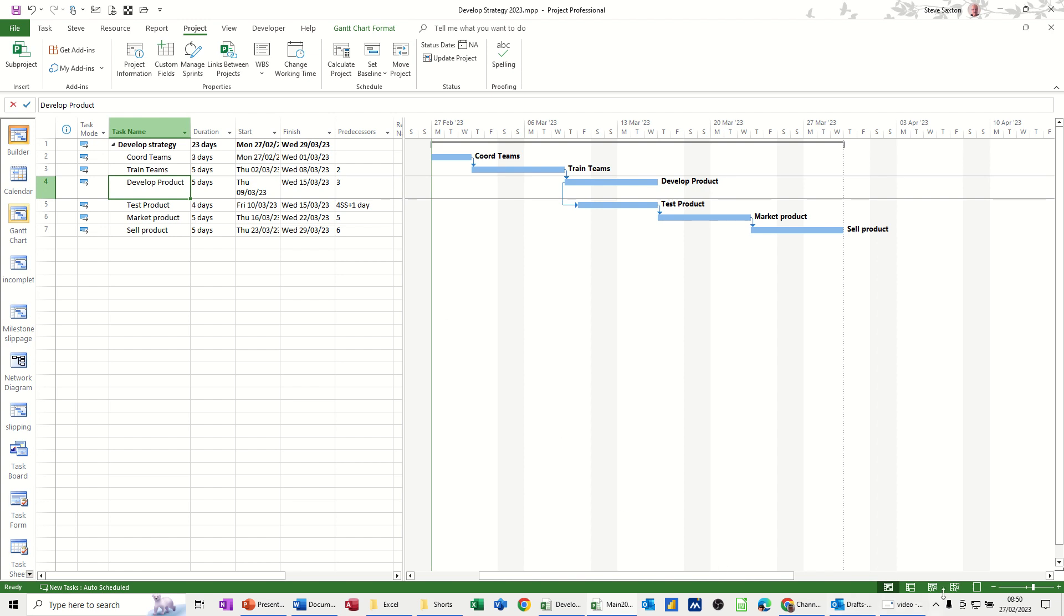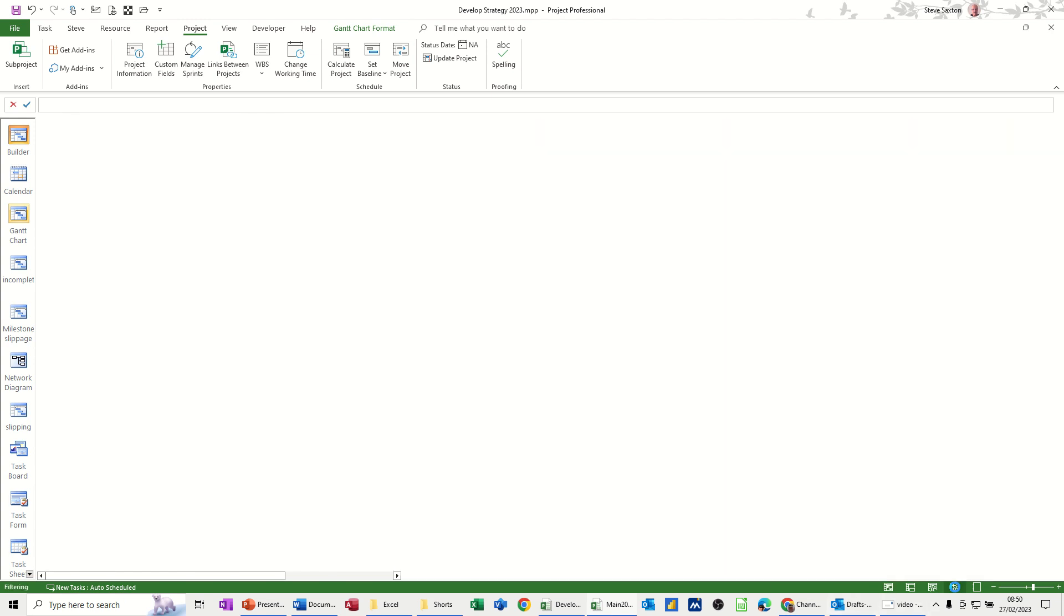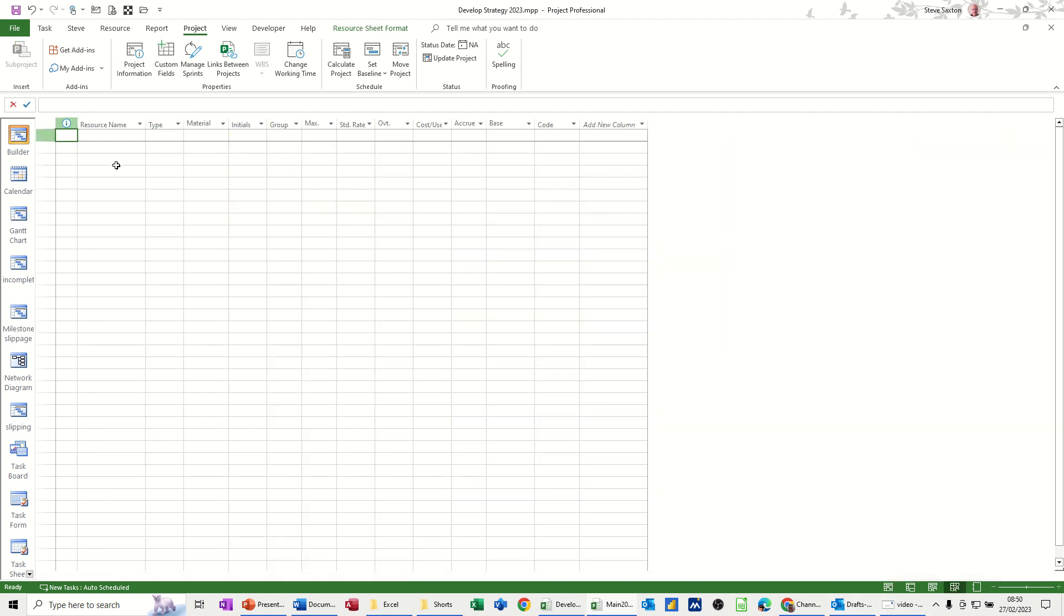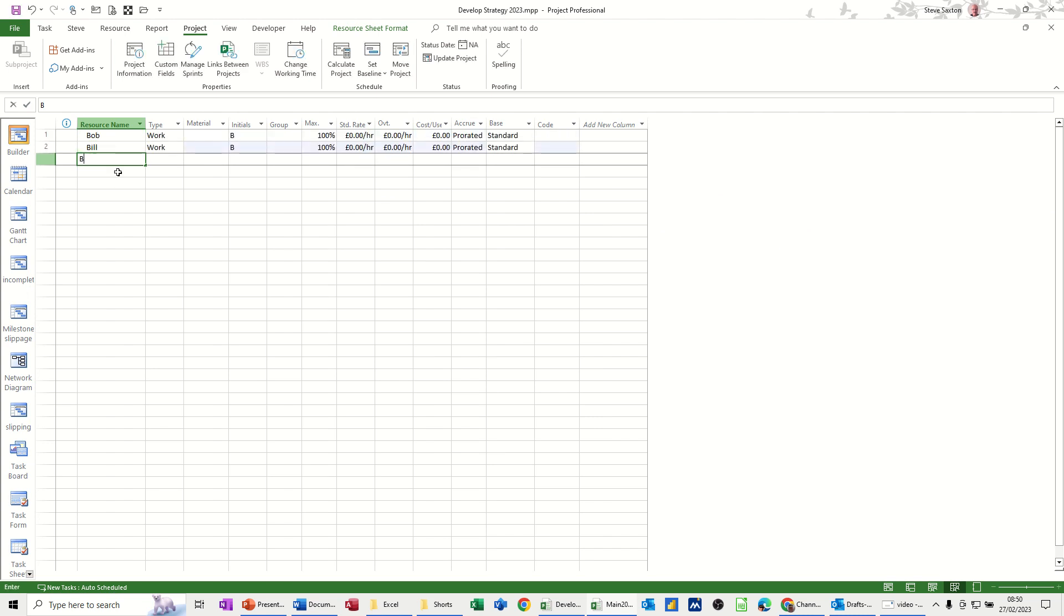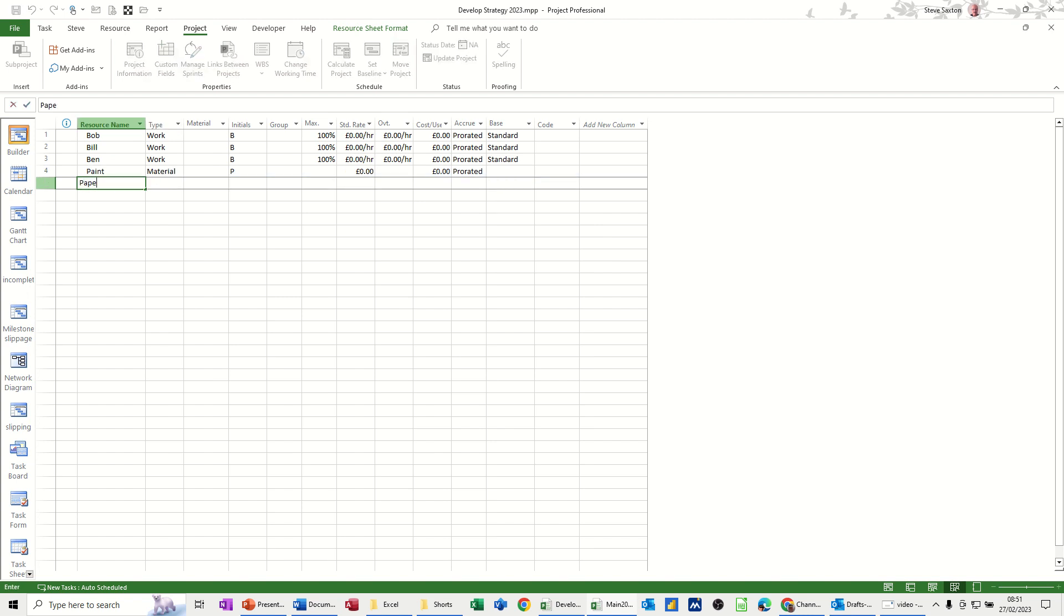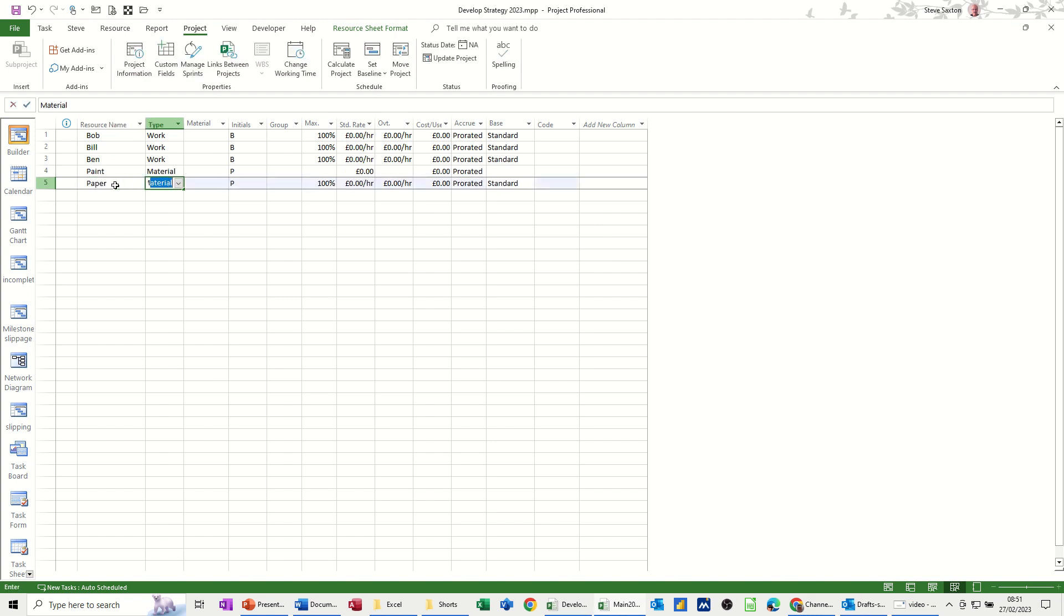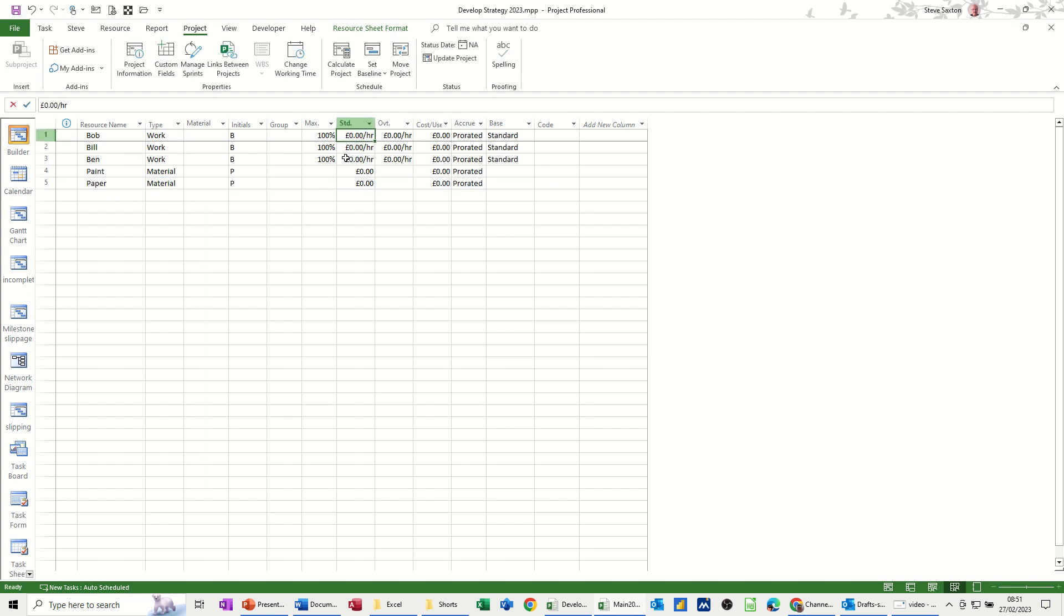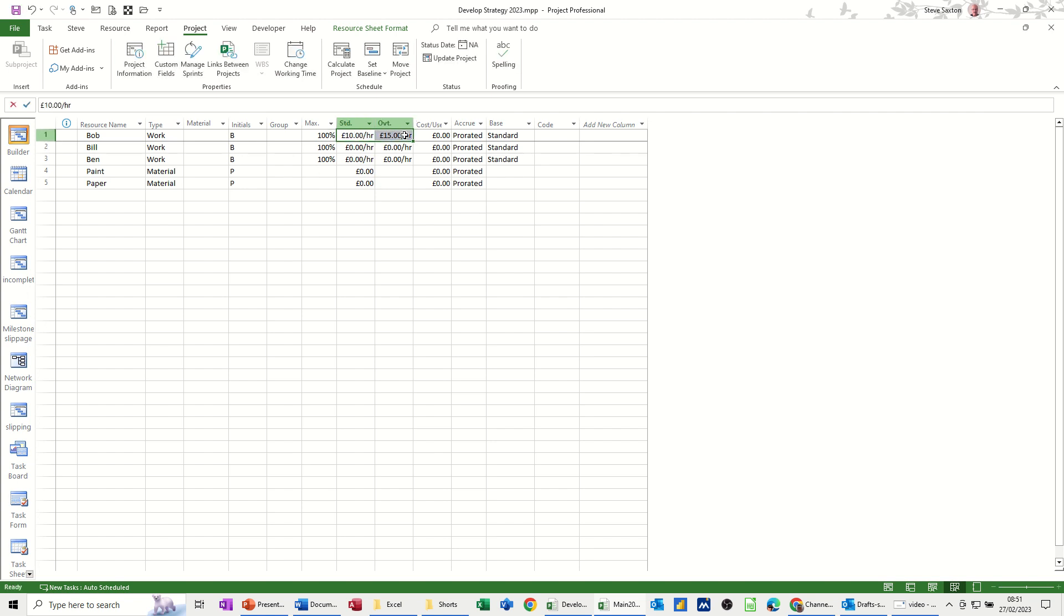So let's go and create some resources. I'll just create a few people, work resources. So Bob, Bill, Ben, and then I'll have some paint, which will be a material resource. So I'll just tap across and type the letter M. That will be material. And then we'll have paper, which will also be material. And those are the two that I'll use to consume during a period. Now, let's give these guys some money.